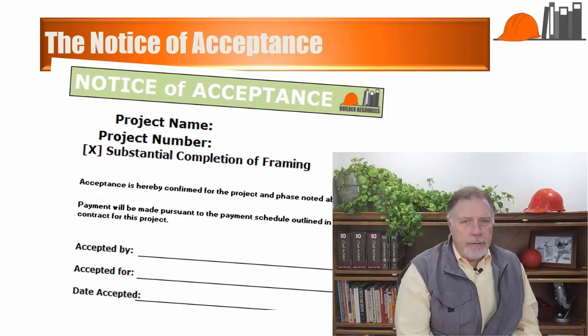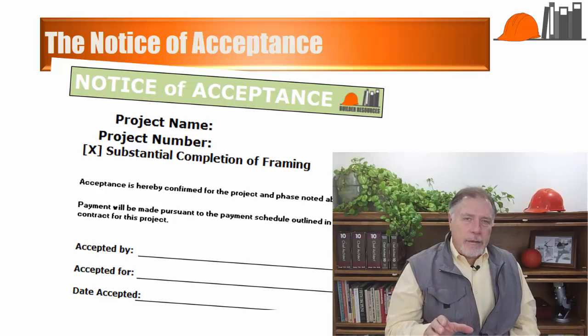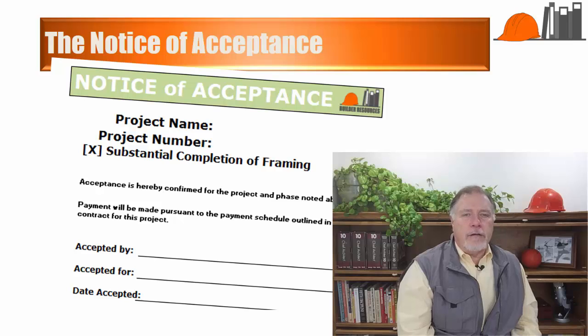The notice of acceptance clarifies that any client-originated changes after the substantial completion of a milestone and the accompanying notice of acceptance are going to be treated as extras and are the financial responsibility of the buyer.